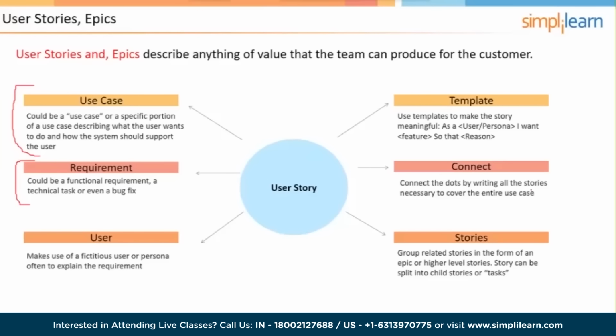So I'm going to go back to the whiteboard, and a product backlog is going to have a lot of user stories that come from the customer, right? Whatever the customer wants done. But the team may know that it has to do some development work in order for the user stories to even be able to work. You know, there's some system level non-functional requirements that need to be done. And so there could be tech user stories. And then, can you see this low? I can't see your chats, but then there could also be defect user stories. There could even be risk user stories.